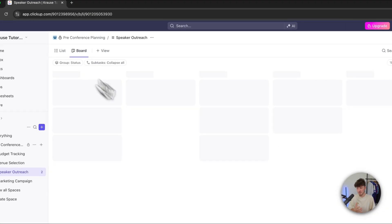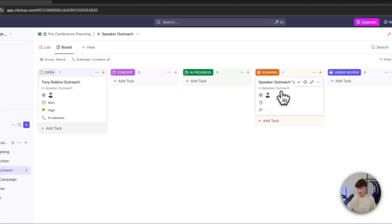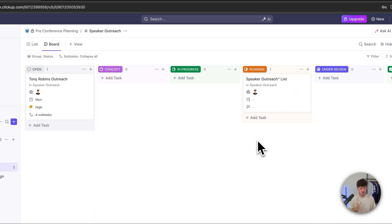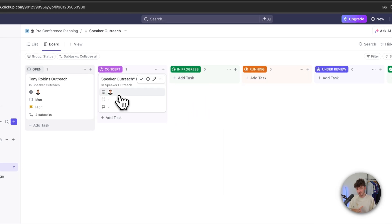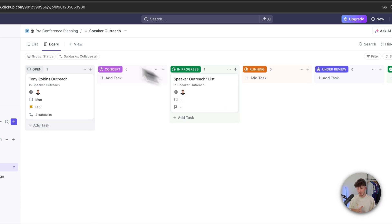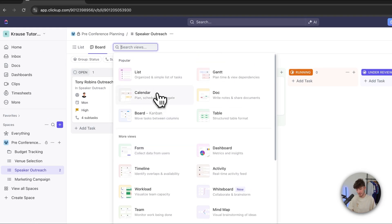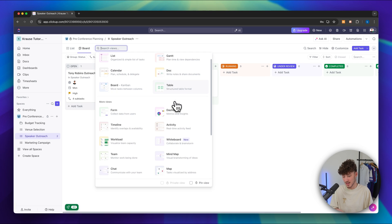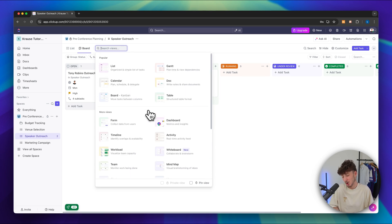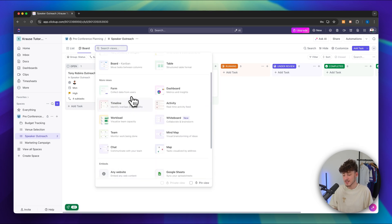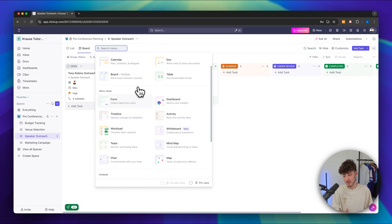When we are now going to change the status of a task, we are going to have all of these options and based off the actual status, this is also going to change the view right here inside the list view. As already mentioned, there are basically multiple ways of viewing all of the tasks. One of these would be the list view — this is kind of the industry norm and the default. There are also some other useful views, like the board view for example. I really like this one — it is a more Kanban-like view, more visual, and you have different tasks inside here which you can drag around. You can also add new views like calendar views, Gantt views, table views, dashboard views, activity views — the options are essentially endless.